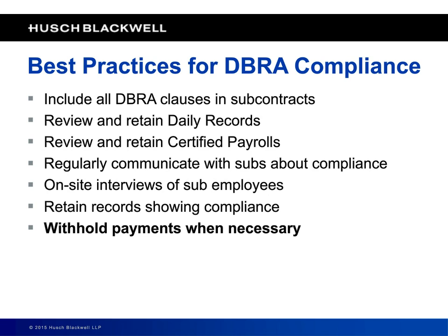Next best practice, do on-site interviews of subcontractor employees. And it's probably that certified payroll clerk that should do it. Or if you want to have somebody in your compliance or audit function come out and do it, you need to do this. Because the Department of Labor is going to come and do it. And it is very helpful if they find a problem that you can go back and point to your records and say, you know, we've been talking to the subs' employees as well, and here's what we're hearing.